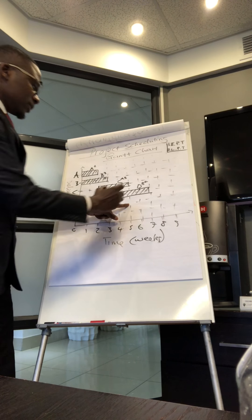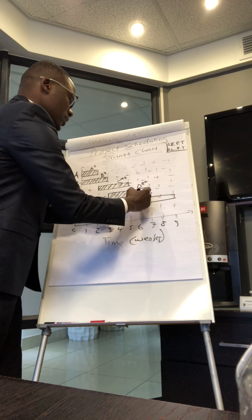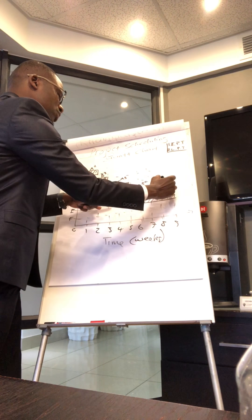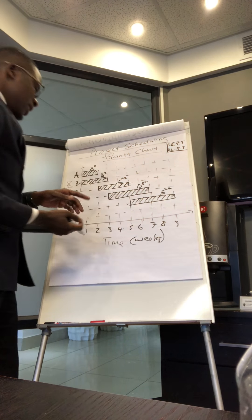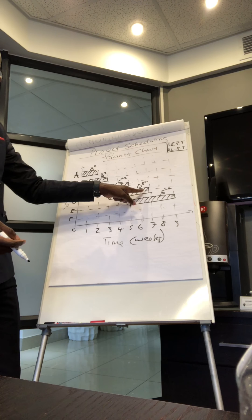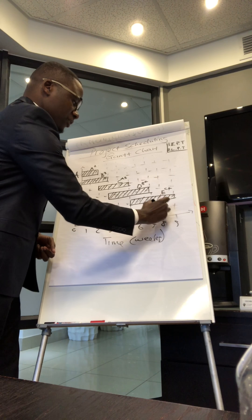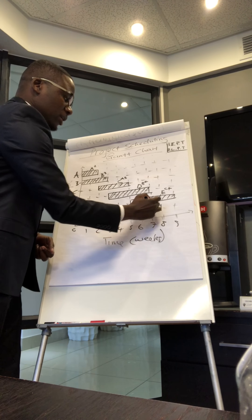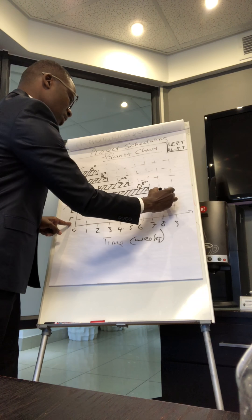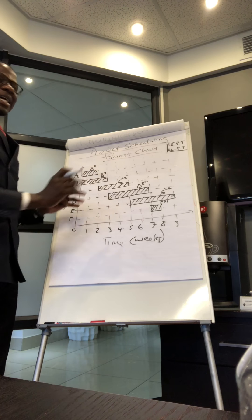Activity E cannot start until C is finished and takes four weeks, so we start from where C ends and draw four weeks. We call this Activity E depending on C, taking four weeks. Then Activity F, the last one, depends on D finishing and takes one week — we start from where D ends and draw one week. This is Activity F depending on D, taking one week. This is a Gantt chart.